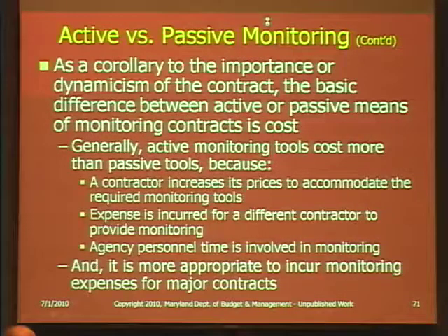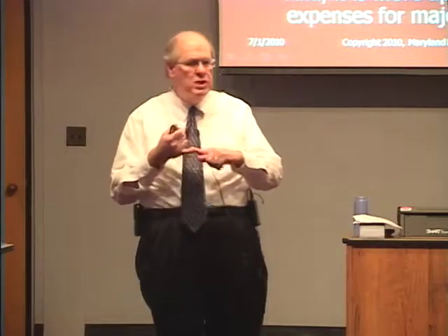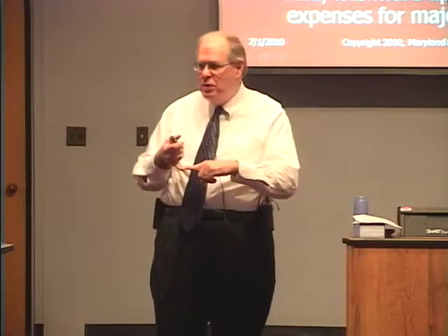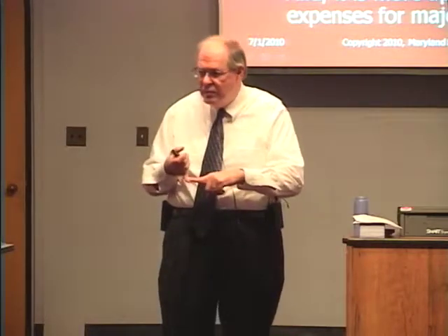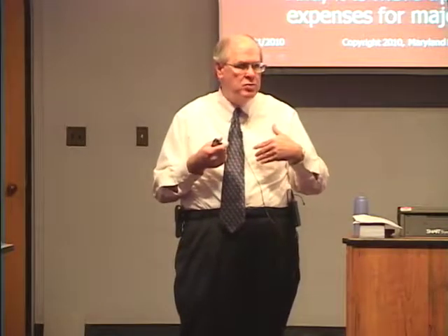And another thing we're going to say in just another slide is it depends a great deal on the target audience of a contract. Who is going to receive the benefit of a contract? If it's something that's directly going to the state and one person can verify whether performance is being achieved, then you typically don't need a passive type of monitoring.